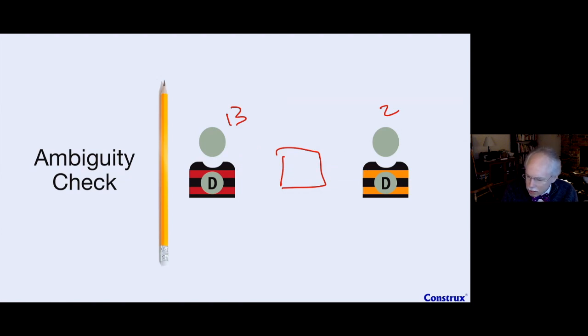Now, if we had come in here and this person said, you know what, I think this is an 8, and this person says, yeah, I think it's an 8, we probably see the work the same way. Now, is it truly in its heart of hearts an 8? We don't care. We don't care what it truly really is, because that is immaterial to the ambiguity that we're trying to expose. So estimation is being used as a way to expose ambiguity and force conversations.